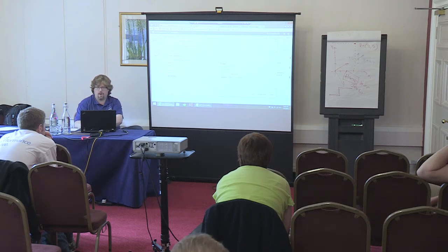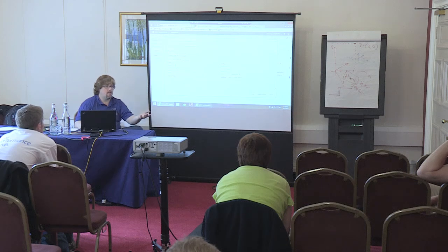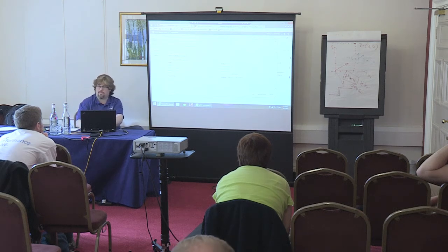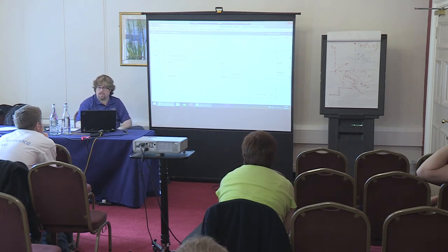And here's where I can assign if I'm doing more traditional project management. On the other hand, if I'm doing work where people pick up work off the board, I'll leave it blank. Specify the work, and typically you do this in hours, so I can say 8. I can adjust the backlog priority here within my sprint backlog if I want. And here's where I can get into that work activity, the area, where I specify that this is for data, okay? If I had set this on the parent PBI, it would be inherited automatically, just like the iteration is. So I can save this.